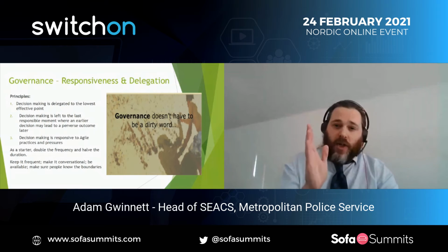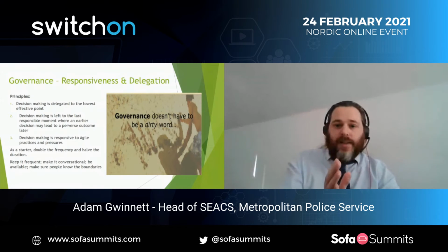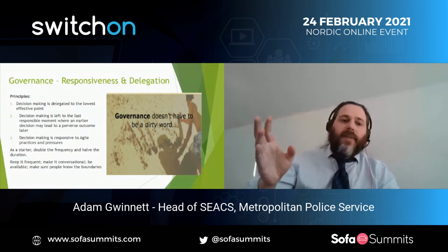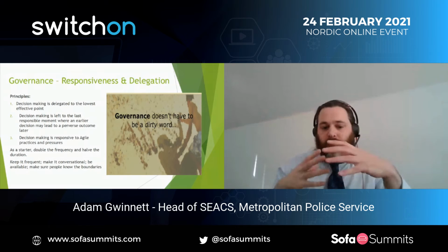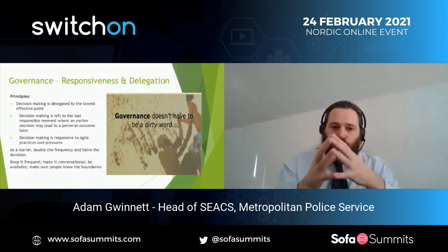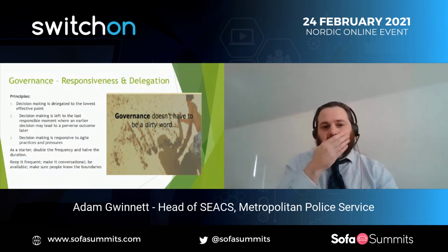Really focusing in on those moments of saying, it's not appropriate to decide that now. We need to decide that, but actually the appropriate time is to do that in a couple of weeks, in a couple of months, and to have those discussions, because it teases out for stakeholders where that key decision point is and what the critical dates actually are versus the milestones and delivery plan.